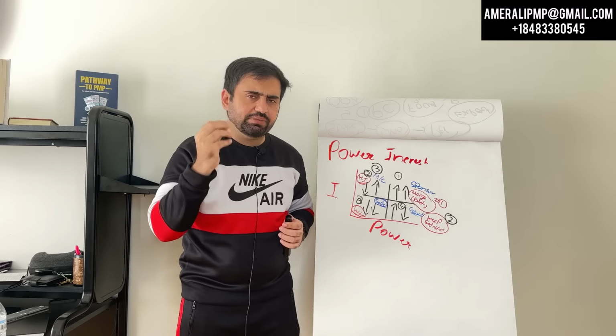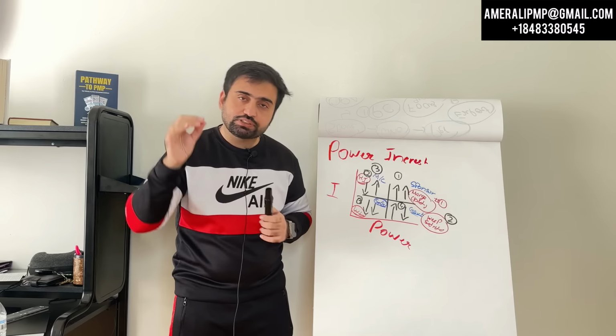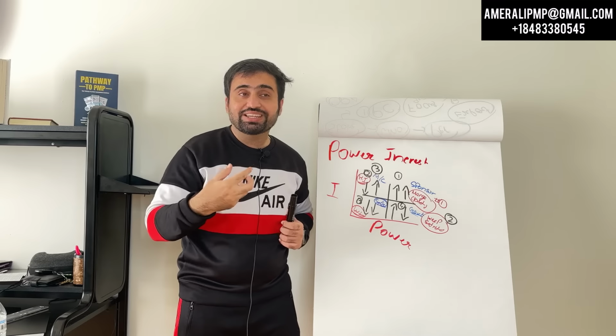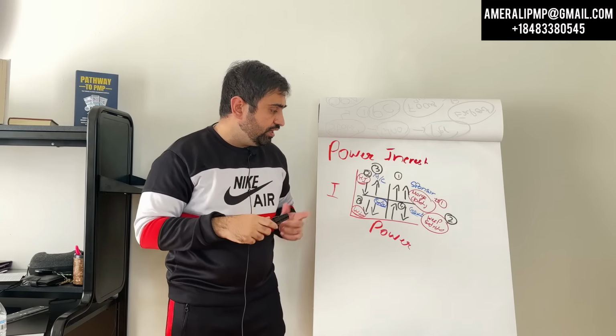At any time in the project, if a new stakeholder is identified, you don't need a change request. You put them into the stakeholder register. You follow the same thing: analyze them, categorize them, prioritize them.